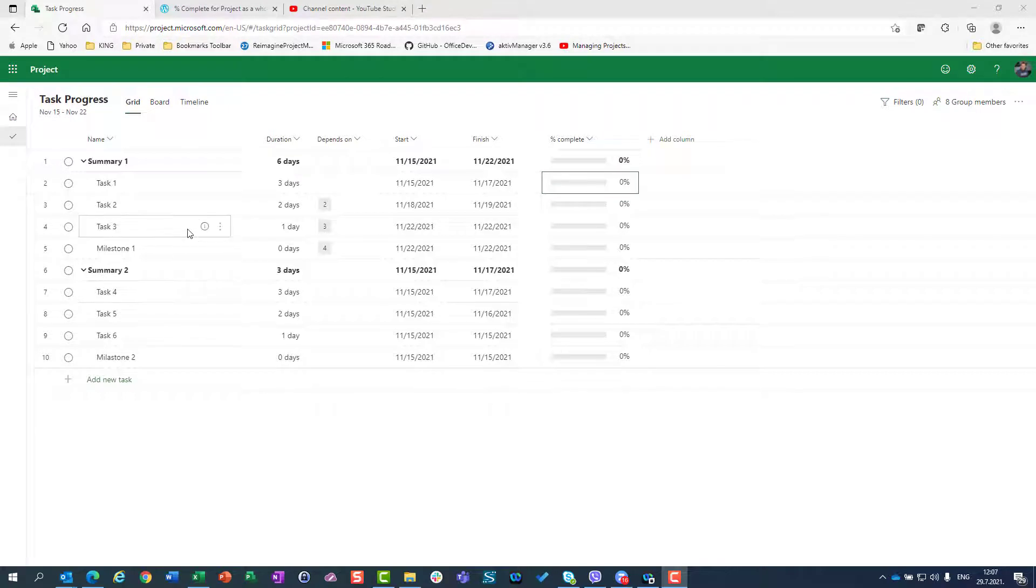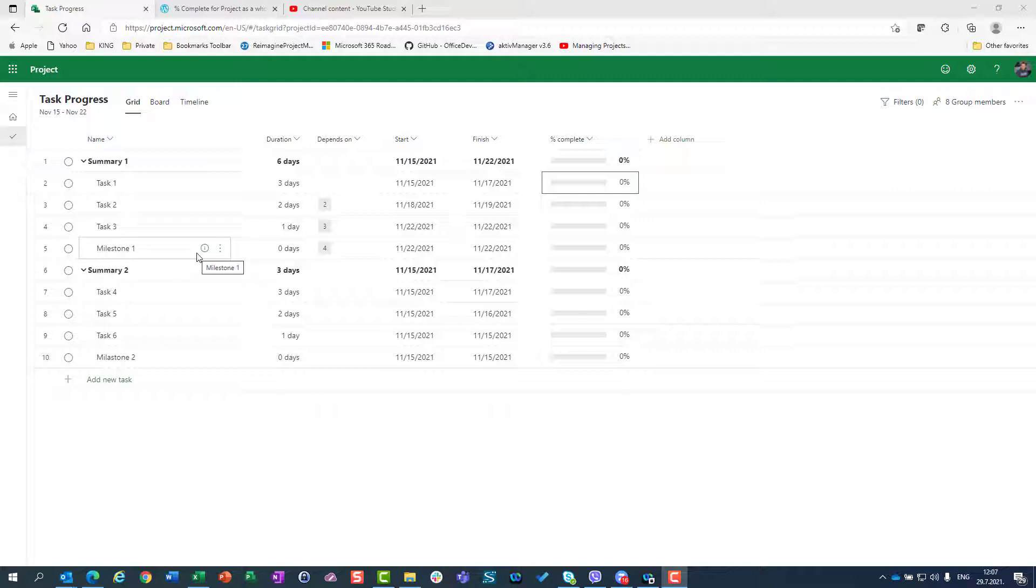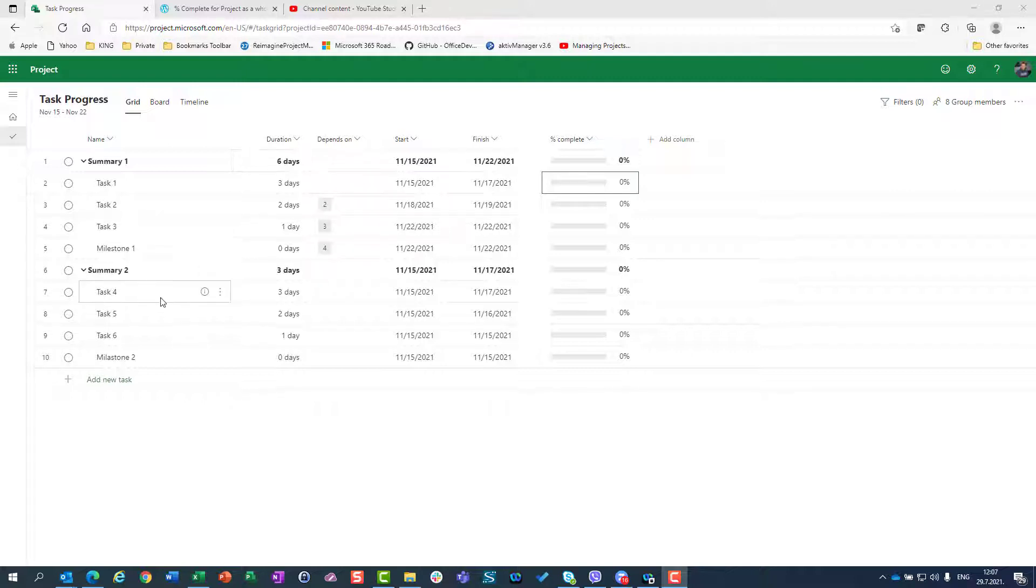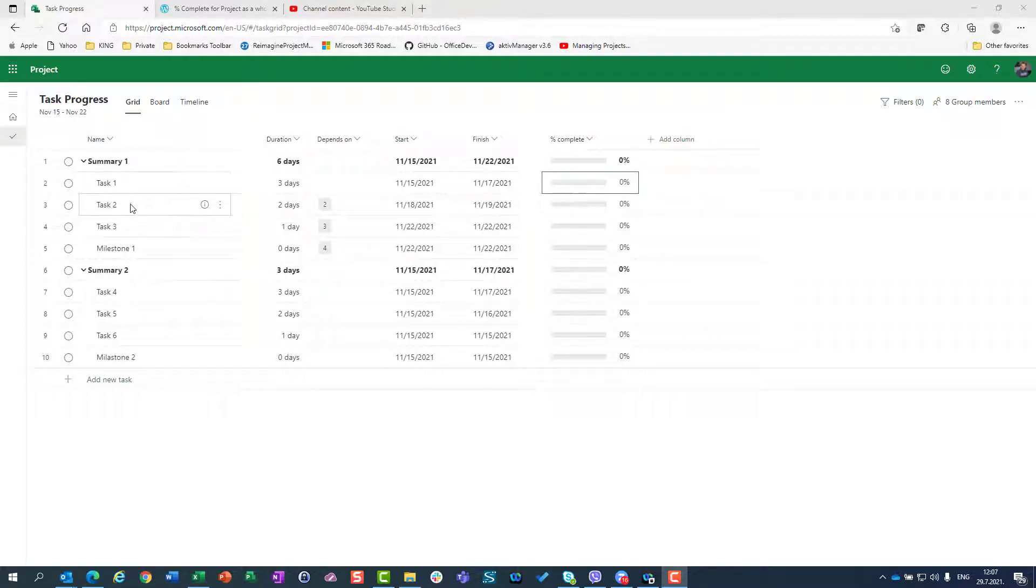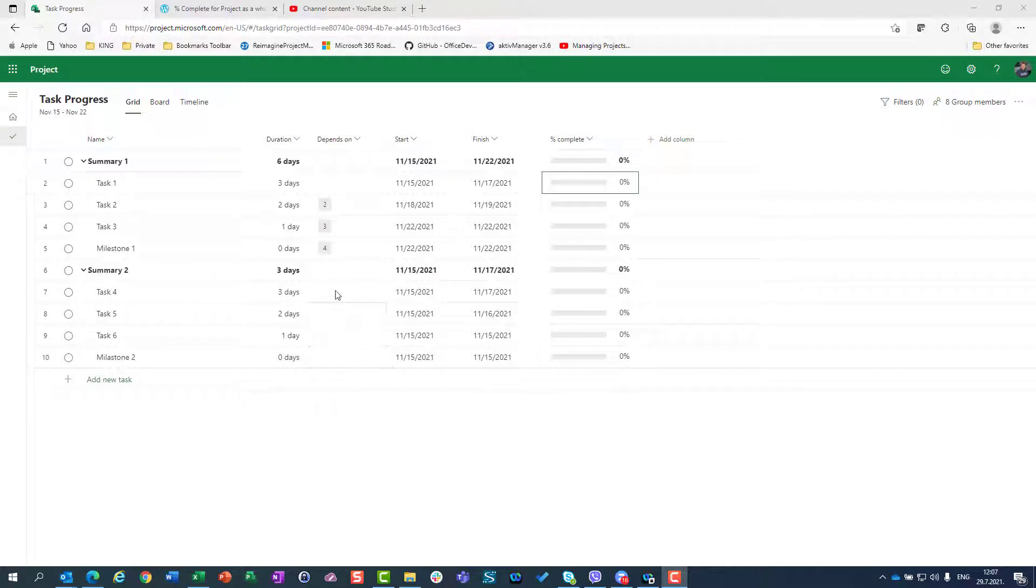Be aware that those first three tasks under summary one are connected, so the total duration is six days. But those three tasks under summary two, task four, task five, and task six, they have same durations like task one, task two, task three, but they are not connected, they don't have predecessors.